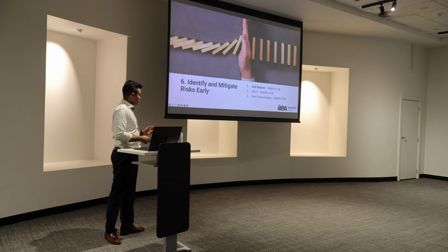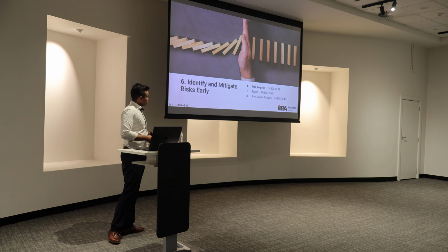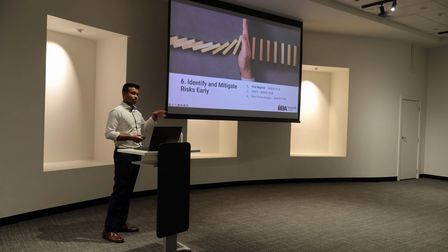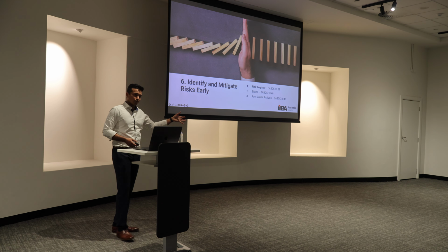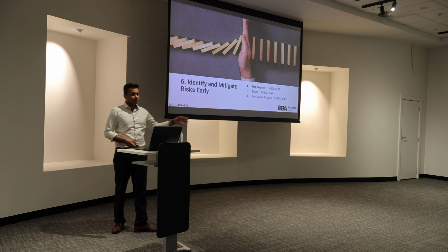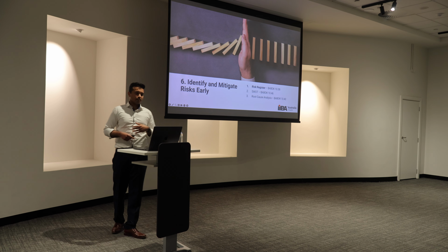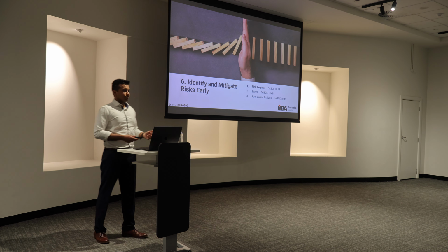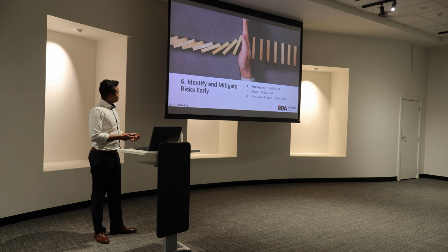Never hurts to do a SWOT. And root cause analysis, there's lots of ways to do it. I like the 5 whys, where you keep asking why each time, 5 times, when there's a simple problem, probably not for complex ones. And by the 3rd or 4th why, you usually get to the bottom of it. For complex ones, there's stuff like fishbone, which I've used only a handful of times at least. But it's a good one.